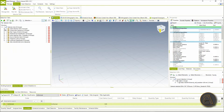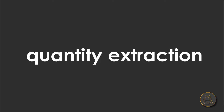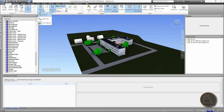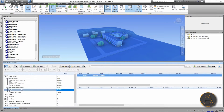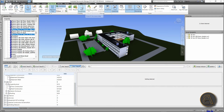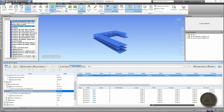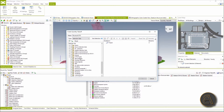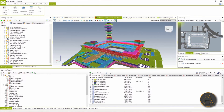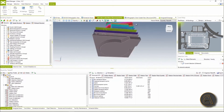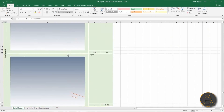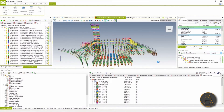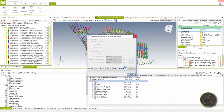Quantity extraction is one of the most important tasks these programs should cover. Navisworks uses a system for creating quantities based on a loaded classification system, but the quantification process is pretty manual and not that fast. Bexel Manager has a quantification tool that is flexible, intuitive, and accurate. It allows easy grouping and sorting of elements into specific quantification groups and has a great option for exporting quantities in a visually stylized quantification report.